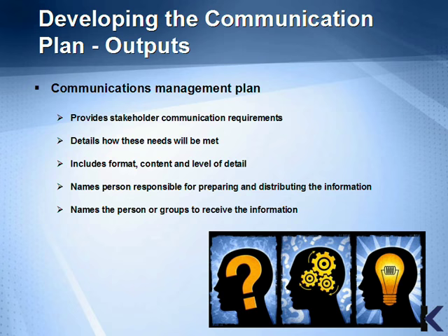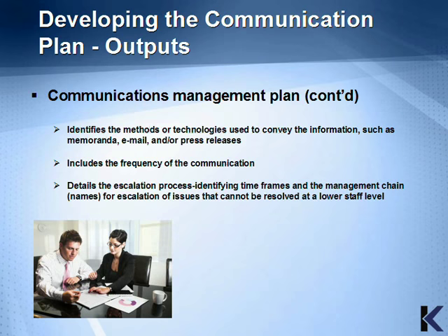receive the information. It also identifies the methods or technology used to convey the information, such as memoranda, email, and/or press releases. It also includes the frequency of the communication and details the escalation process, identifying timeframes and the management chain for escalation of issues that can't be resolved at lower staff levels.